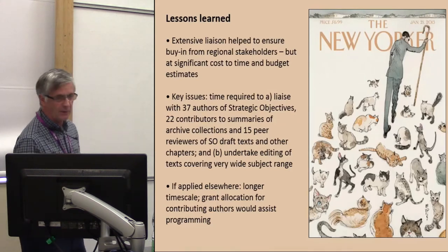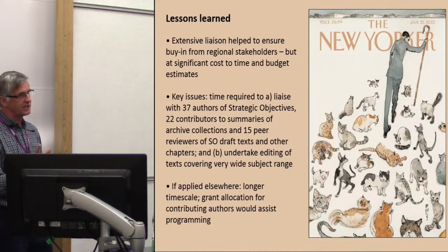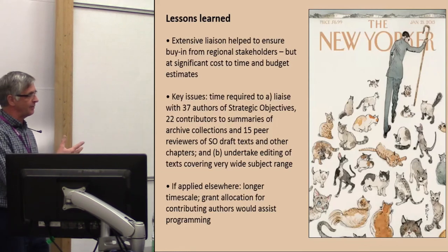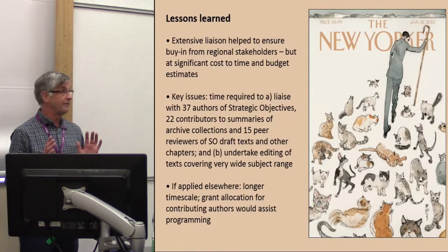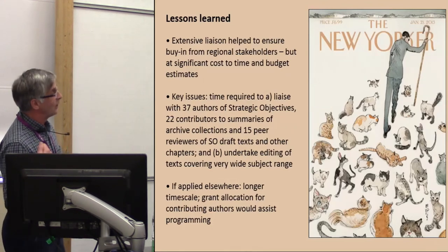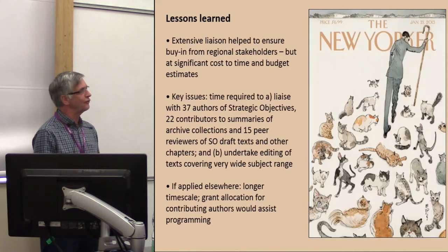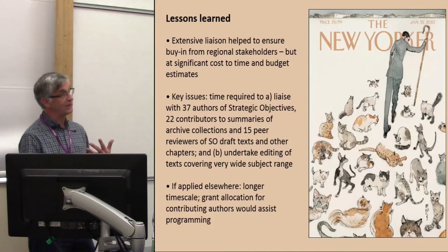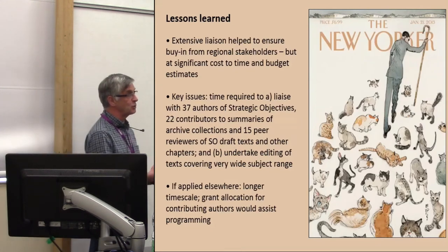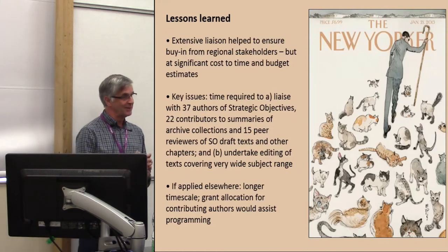I've shown the maths here, I won't go into them in any detail, but we had a lot of contributors, altogether about 65 contributors, and editing those and liaising with them was an extremely time-consuming but very useful task. And I think in terms of lessons learned, if applied elsewhere, we need a longer time scale. Although we had a lot of useful feedback from the writers, if we had had the opportunity for some sort of small grant allocation or bursary, particularly for those working in archaeological units, for example, that would certainly have eased the process of monitoring. So that's something for the future.